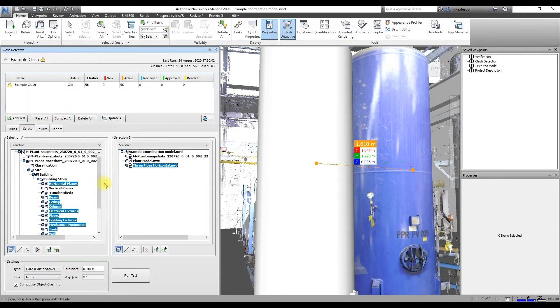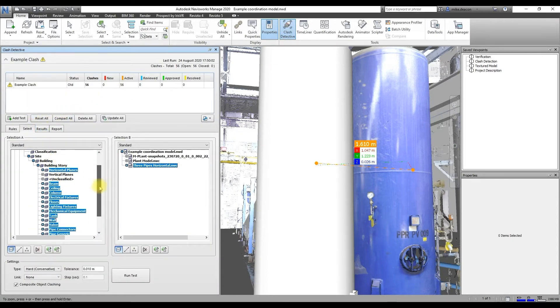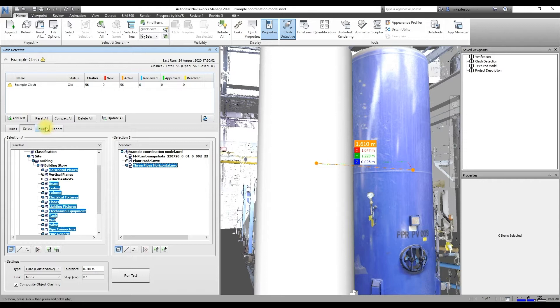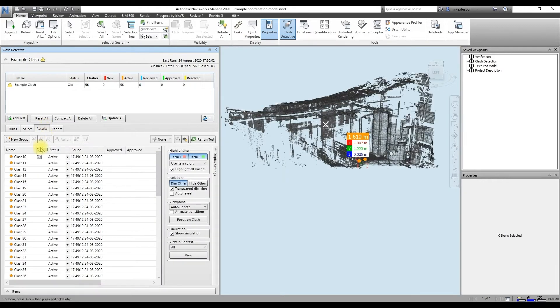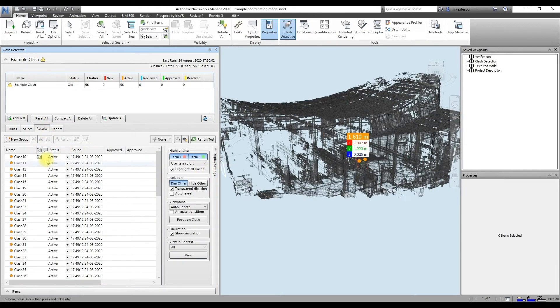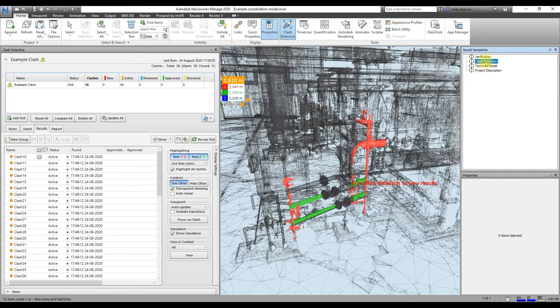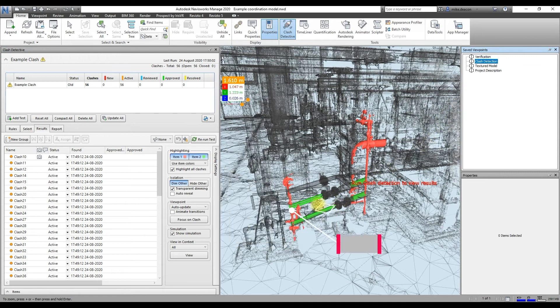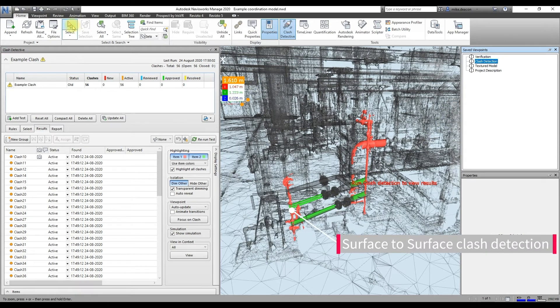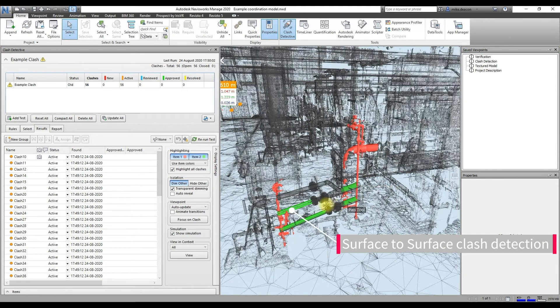The other workflow we can do in here is use that classification to help enhance our coordination processes, so clash detection. So here we can define which layers we want to clash to, so in this case our classified layers, and we can clash those against any of our trades from the design data.